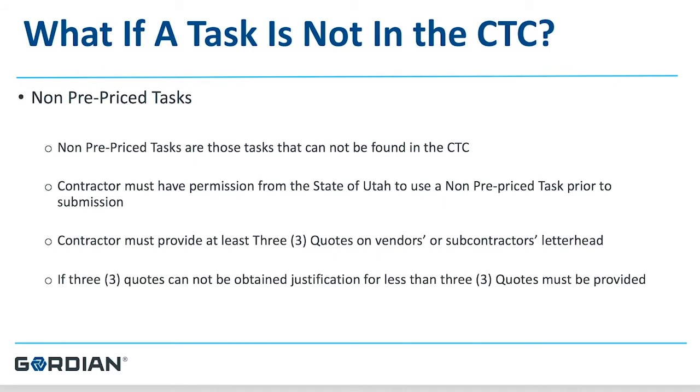When you encounter this situation, you will have to create a non-prepriced task — meaning the 180,000 line item catalog does not have the item you're looking for. This can happen commonly in the LED lighting section, as LED lighting changes rapidly. If you are looking for a certain LED fixture and cannot find it in the price book, you will be instructed to create a non-prepriced task. You can actually add to the price book over time. The contract has a clause that if a non-prepriced item is used on three different proposals, it can be added to the price book in the next contract year. Think of the CTC as a living and breathing document.